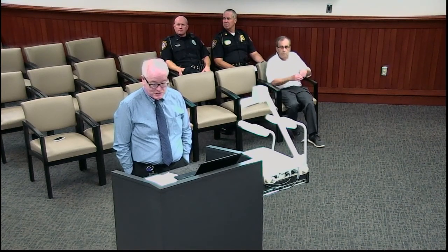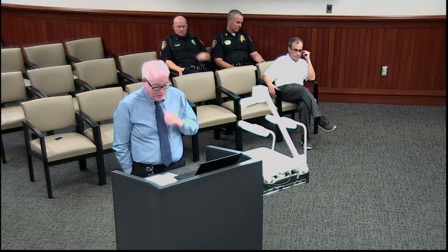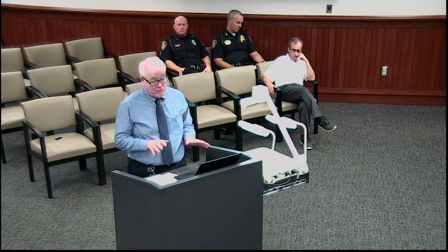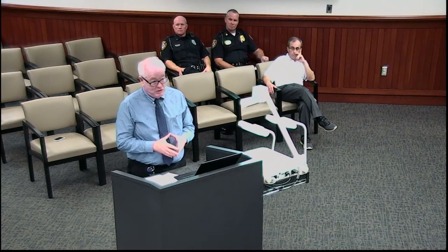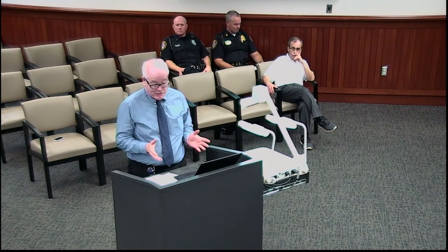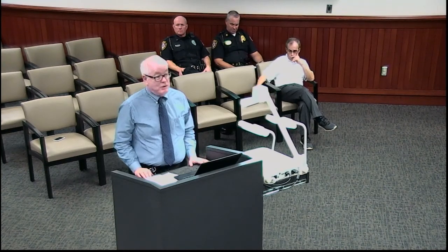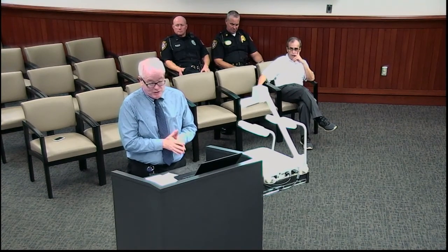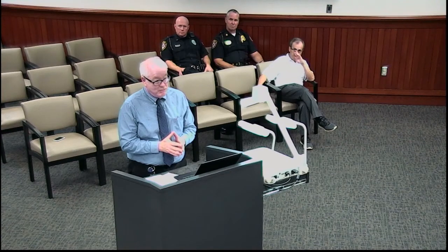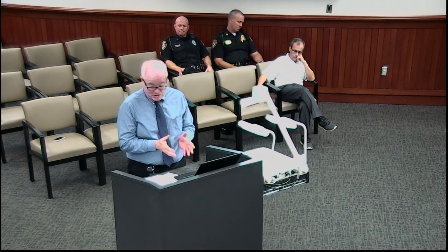I'm here to speak on behalf of Union County Public Schools. I'm the facilities project manager for the construction projects. I'd just like to say a few brief things. We don't typically get the cart before the horse like this. It was discovered by our engineer during his final design research that the survey we gave him said there was in fact a right-of-way there. Typically, we'd ask for the abandonment and restructuring of that later and then proceed forward. We knew about a week before the project was going out for bid, so we went forth with the bid because of the bid climate. We didn't want to wait any later, and that's what brings us to this situation today.